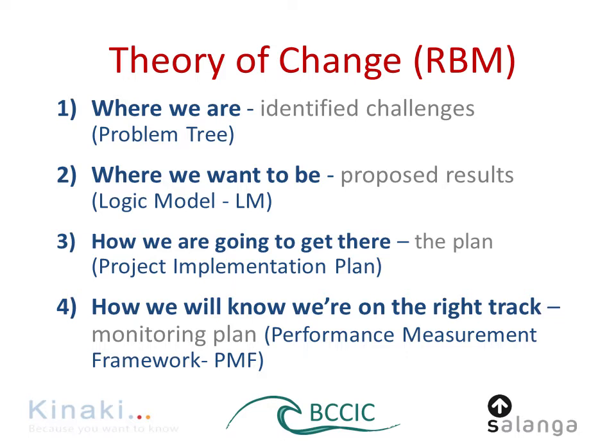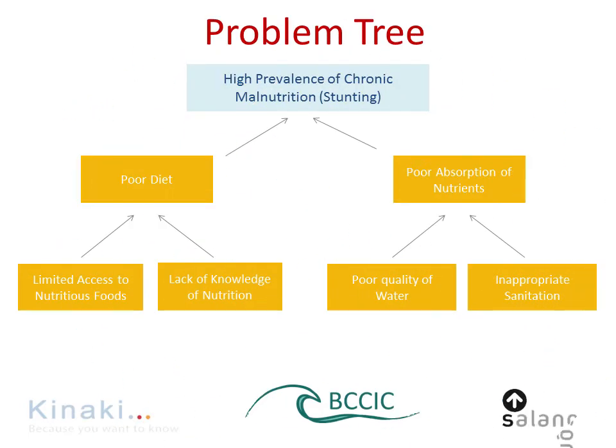And that's basically where the performance measurement framework would come in. Now, this sounds really difficult, but we will dive into it a little bit later, and you will see that it's actually not as difficult. Basically, what the PMF is, is taking your logic model and assigning to each output or each result that we expect to achieve during the life of the project, or to contribute to, specific indicators, which helps us to measure how we are really doing. So let's now dig a little bit deeper into it.